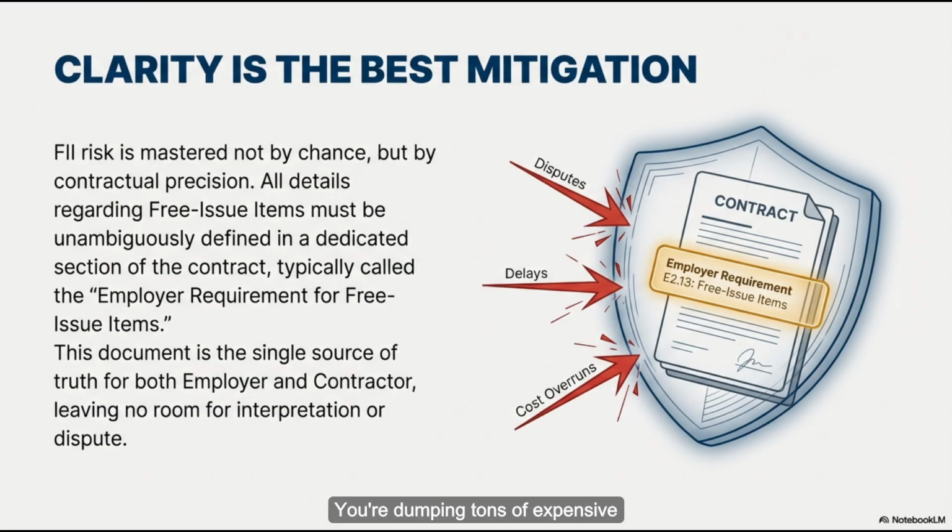You're dumping tons of expensive, hazardous chemicals into a reactor. If you do it wrong, the reactor doesn't work. It's a one-shot deal. So again, the employer carves out that specific risk and says, I have specialists for this. I'll hire them. You just stand back. It's all about control. Project management is, at its core, a form of organized control freakery.